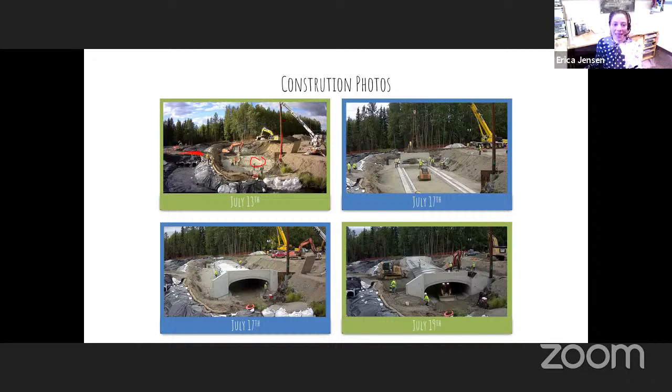For the shoring plan for the pole, the contractor was required to create the shoring plan, and then it was going to be approved by MLPCEA, because when it was the utility company's pole, we wanted to make sure they were okay with the shoring plan. And because the contractor was going to be implementing the shoring, we wanted the contractor to be required to do the shoring plan. This was their shoring plan. It was approved and it worked. The pole did not move.